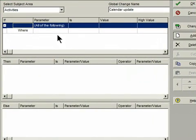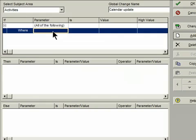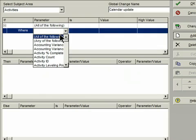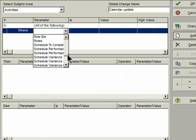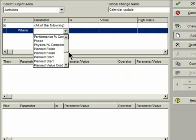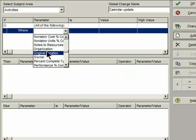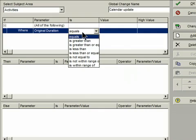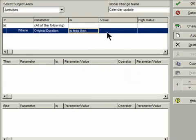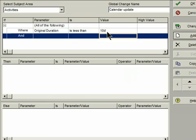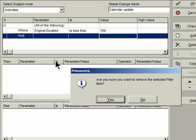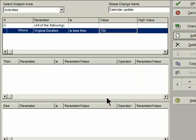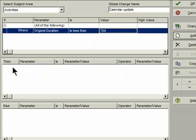In the Calendar Update change, what I'm going to do is find activities in my project plan that have a duration of less than 10 days. So, in the If section here, I'm looking for the Original Duration field. If the Original Duration, and see in the Is drop down here, I'm going to choose Is Less Than, and I'm just going to put in 10 days in the Value field. I put in this extra line. I'm just going to delete it. We don't actually need that.